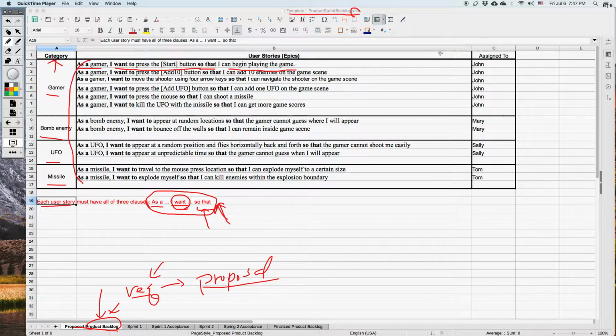Depending on the course, you may be allowed or required to do it as a team project. In that case, you need to specify which member is going to take care of, or is responsible for, each user story. Also remember that a user story is simple and small enough that it could be done within one sprint, also by one member.